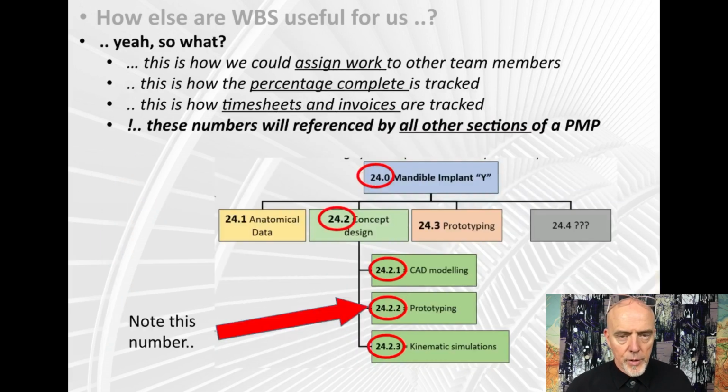So what? Who cares? The benefit of this is how you assign work to people. If you've been given a task and you have the opportunity to outsource it, you can now break it down. And as you get to those stages, you can make a decision. Do I just outsource some of those level 3s to them, or do I give them the responsibility of all of that level 2?